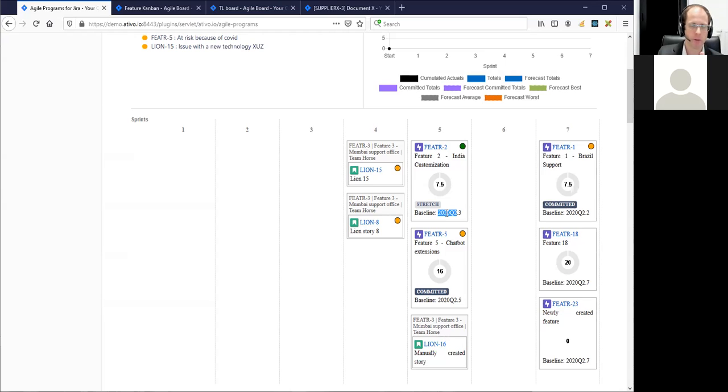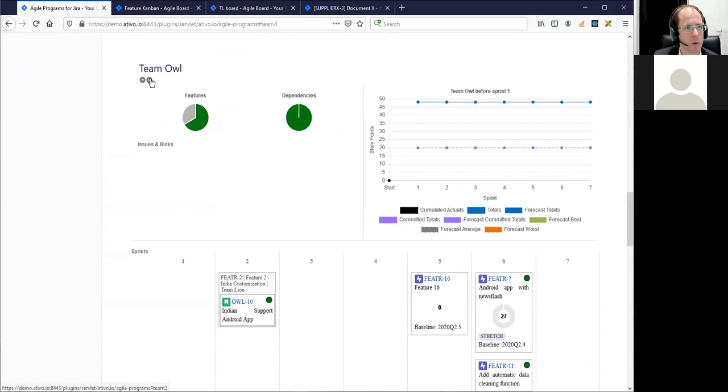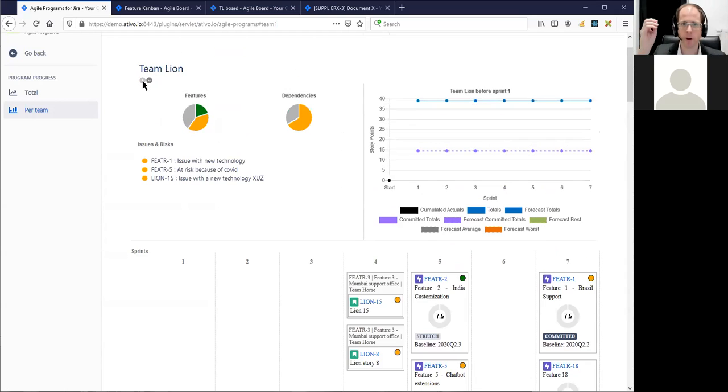But if there are stories under it that are shifting towards a later sprint, the system sees it and says, okay, it was planned in sprint 3. But because there's a story under it in sprint 5, it's currently delivered at least in sprint 5 or later. So it's moving along. And what you also see are the dependency stories, not with chords, because it would be messy. We have quite a few dashboards if you have 10 teams and chords going all around. So actually here it's annotated simply like this.